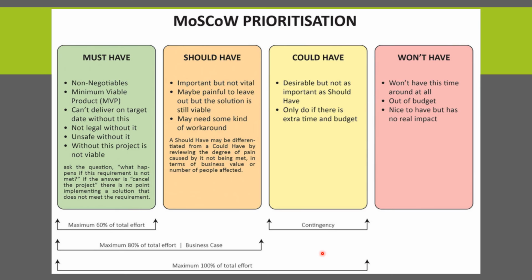So that is the reason you can initially go with a stretch goal as well, so that after 4 or 5 sprints or after 10 sprints, you can understand what average business value or average velocity the team is coming to, right? So this is one of the ways of putting your backlog items in place as part of the sprint backlog, which is very, very important.